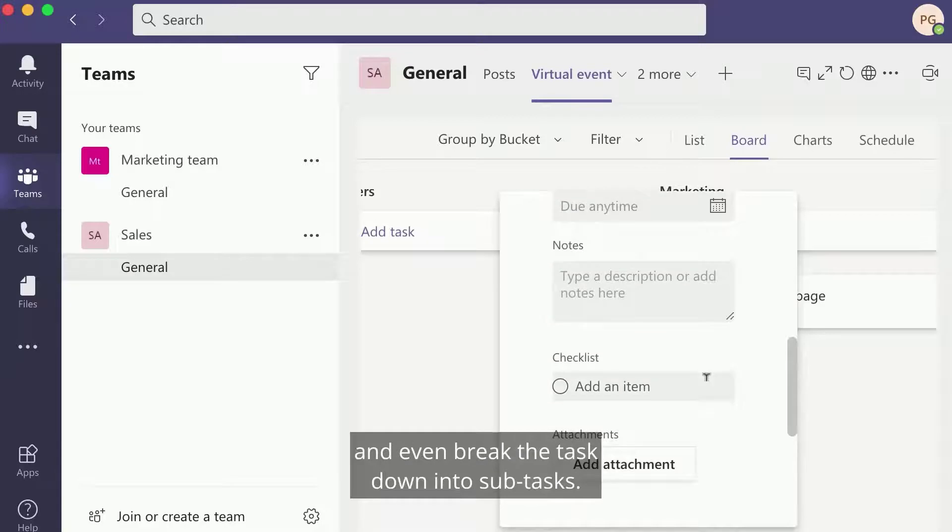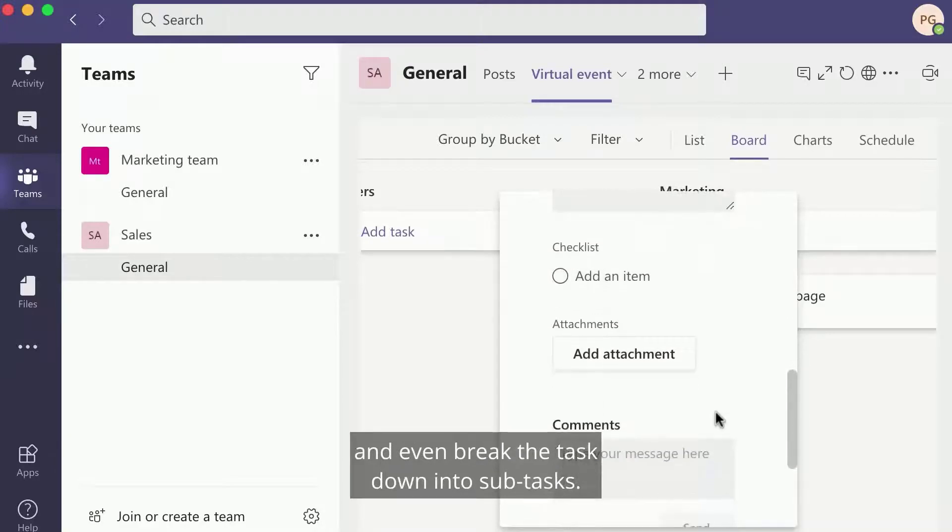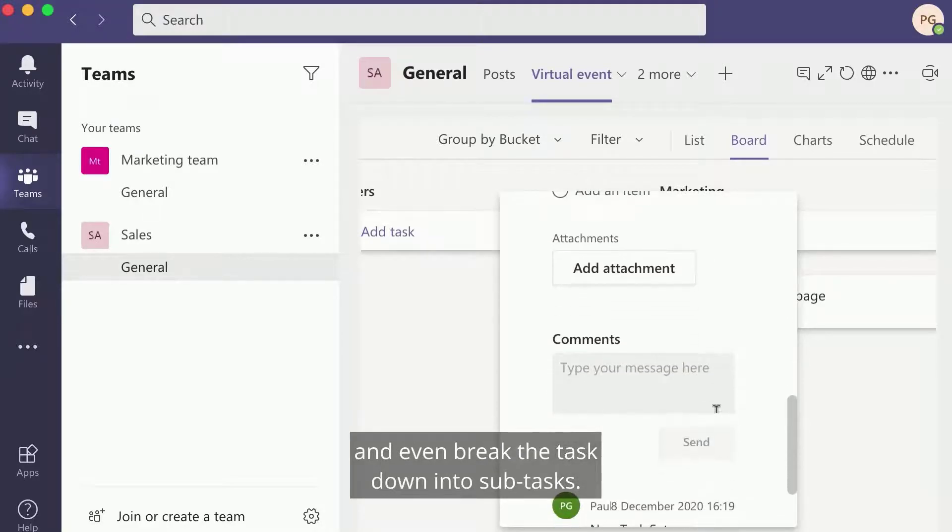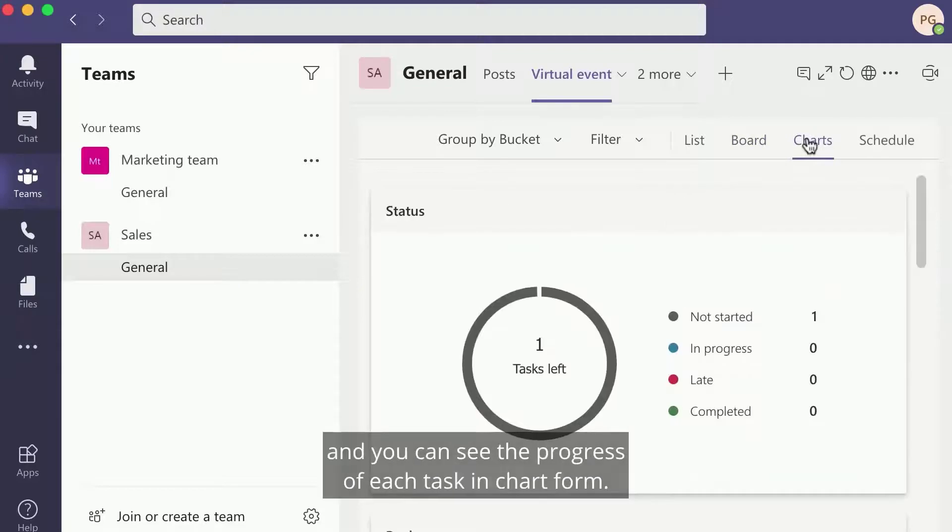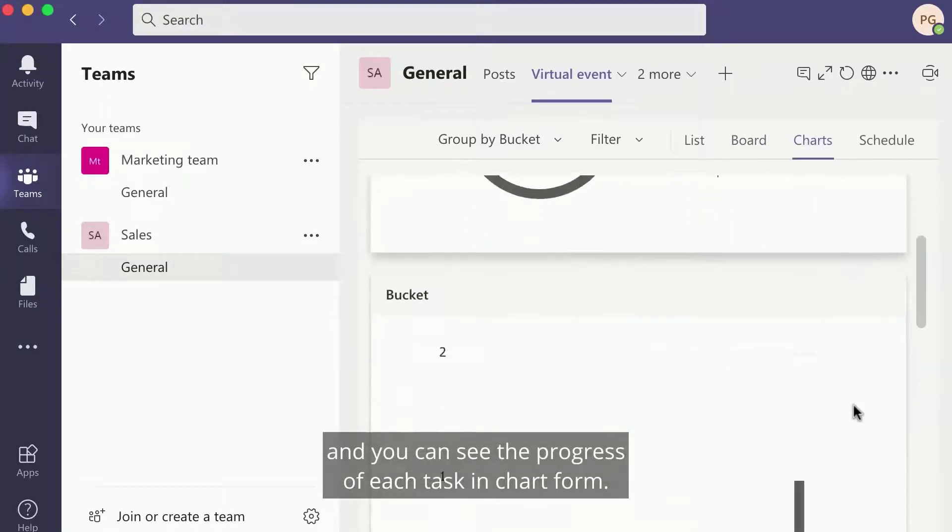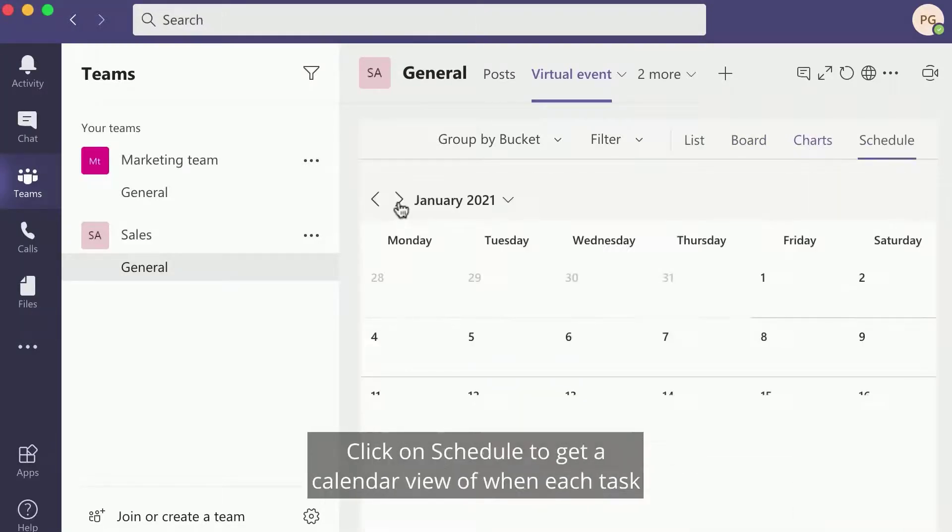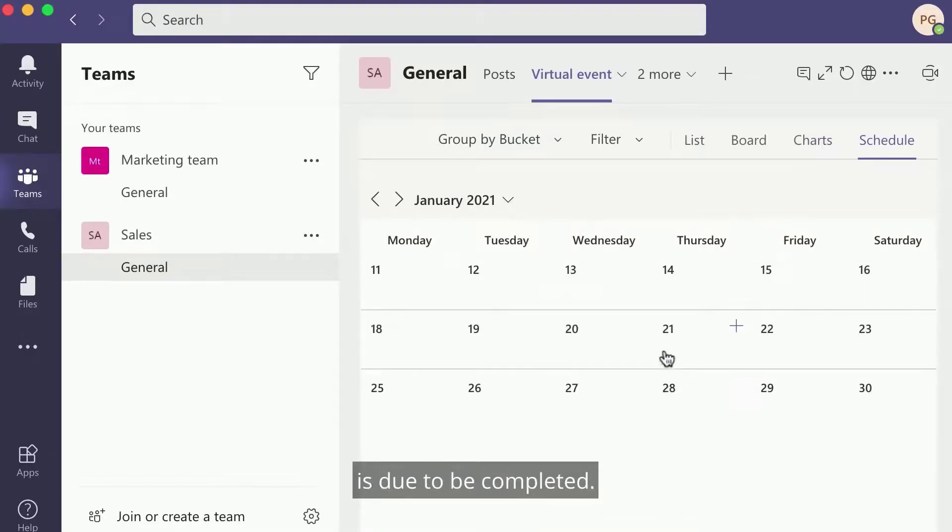Add comments and even break the task down into sub-tasks. Click on Charts at the top of the Planner screen and you can see the progress of each task in chart form. Click on Schedule to get a calendar view and when each task is due to be completed.